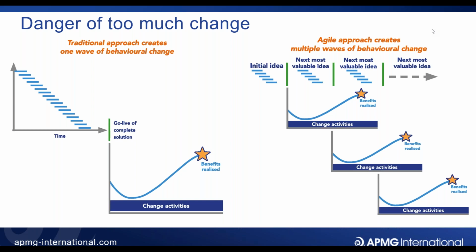And you can create a plan where you work out the logical order of those things. I don't need to keep stopping and asking, have we got any other ideas about how we'd like to make this packing happen? Or are there any other things that you'd like me to expand on? Now, I don't need feedback, and I don't need to keep iterating through. I just need the job done. So a traditional approach is the most cost effective in those circumstances where there's no uncertainty and there's no experimentation needed.